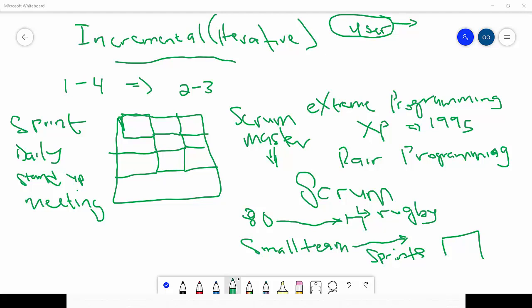And we said that an iterative model will take a slice of the software you are building and then iterate through the phases of the waterfall model, use that as a mini project, deliver that to an internal stakeholder, then go to another slice, iterate through those phases again until you complete all the phases.